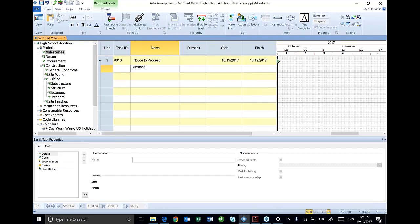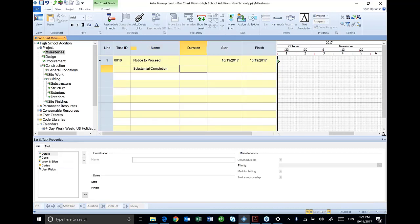I'm going to do the same thing with substantial completion. Make it a zero duration, so it will also be a milestone.